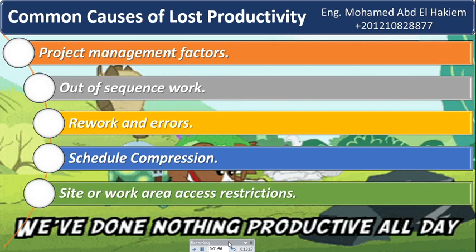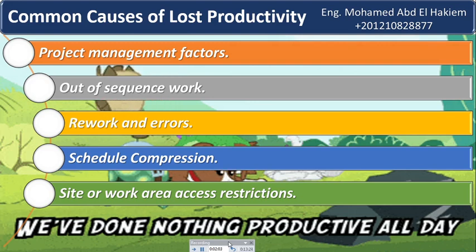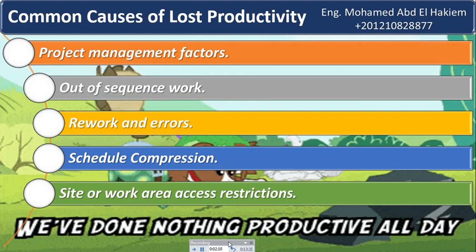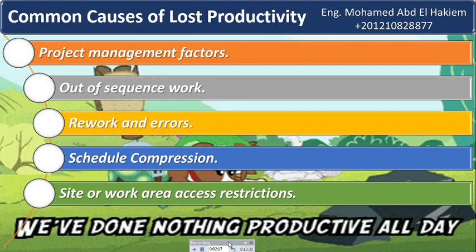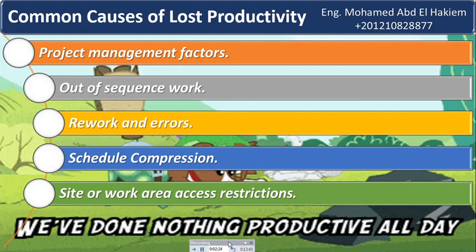Twenty-three: site or work area access restrictions. If a work site is remote, difficult to get to, or has inefficient or limited access, productivity may suffer because labor, equipment, and materials may not be on site when needed. Additionally, productivity losses may occur when access to work areas is delayed and the contractor is required to do more work in a shorter period of time, which may result in overmanning, dilution of supervision, and lack of coordination of the trades.